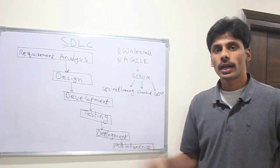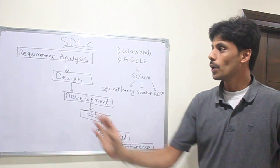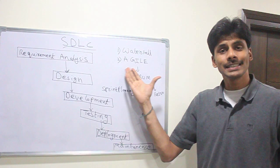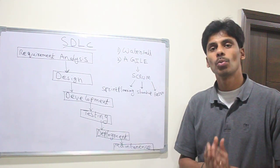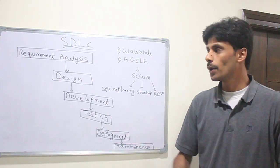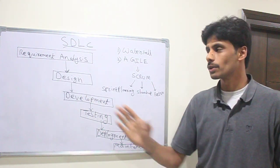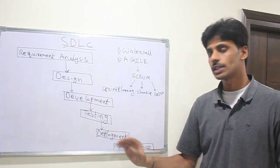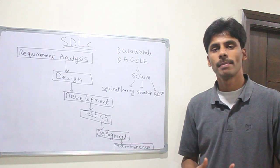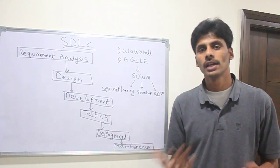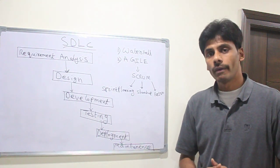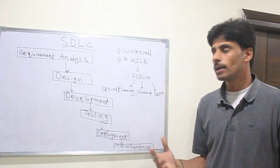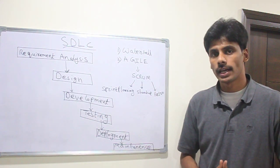With the agile approach, we can overcome these limitations. In the agile approach, we take only a set of requirements — it's an iterative model. We take a little bit of requirements, then do the design, development, and testing, deliver it to the customer, and get instant feedback. If there is an evolving technology, we can easily change our product as it evolves over time. Getting instant feedback is one big advantage of the agile approach.